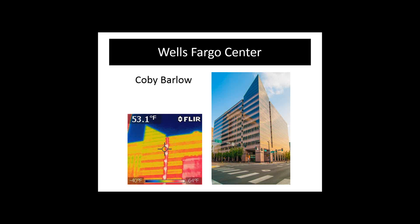And then along comes the Integrated Design Lab to help us out with this. And they said, well, instead of doing two new chillers at 250 tons, we can help you reduce the load that the building actually requires and use a smaller chiller. So now not only do I do a chiller replacement, but I can actually do a smaller, more efficient chiller. I can run less load. I can save more money. And from this one idea of, well, I need a new chiller to fix all my problems, we really did come to an actual integrated solution with all of our systems.